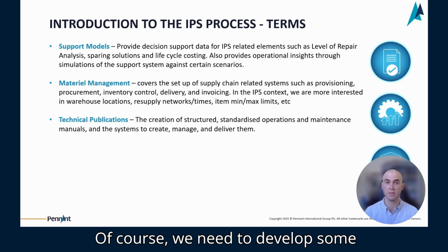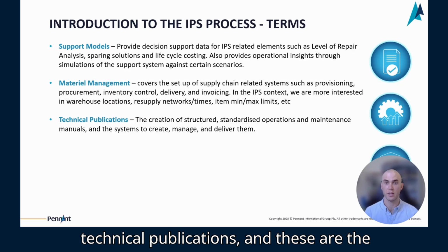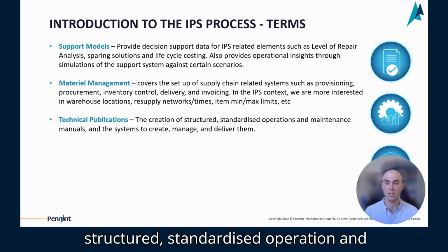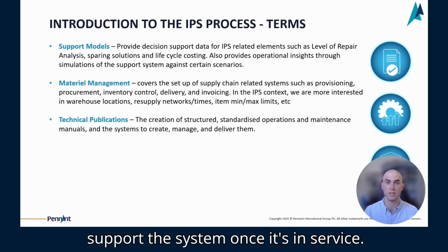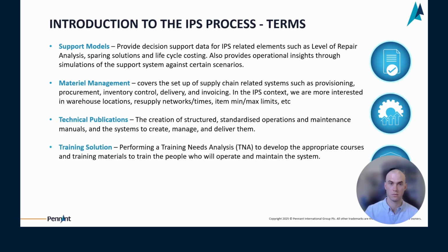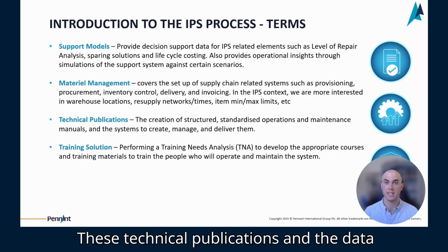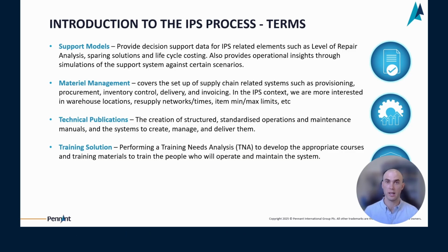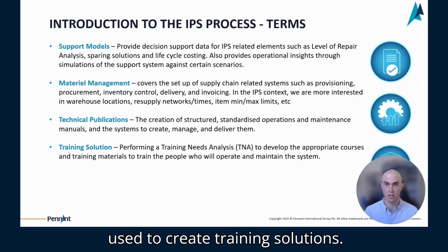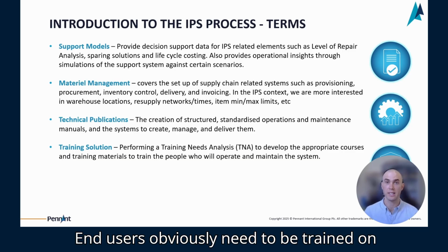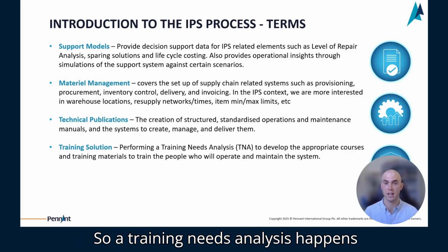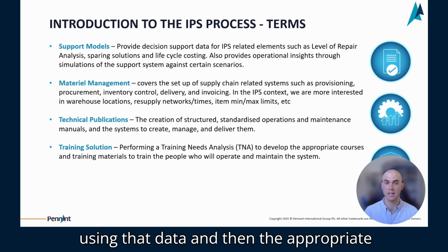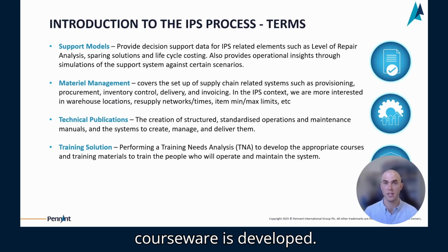Of course, we need to develop some technical publications, and these are the structured, standardised operation and maintenance manuals that are used to support the system once it's in service. These technical publications and the data that they use are also used to create training solutions. End users obviously need to be trained on how to operate and maintain the system. So a training needs analysis happens using that data, and then the appropriate courseware is developed.